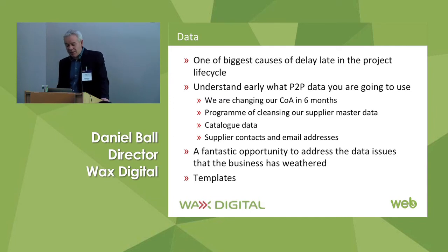typically much of the build and test will have been done using a small, anonymized data sample. So it's not until just before you're about to go live and do the final round of testing and cutover that the full data load is actually made to the production system. And it's not a good thing, obviously, to find out at that stage that there are major issues with your data. And don't forget, it's not just about populating spreadsheets of supplier details.